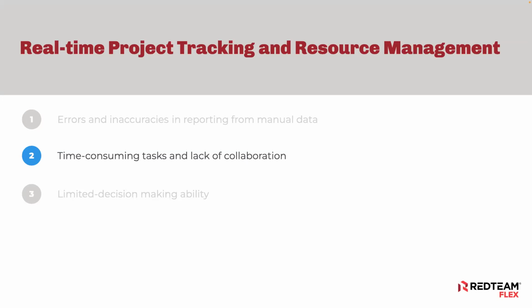So it was really safe to say that change orders consumed a lot of my time. And really, when you think about what goes into manually creating a change order, you're attaching that information, whether it's a drawing set, additional specifications, information on material, you're soliciting that price, you're ensuring that all scope was caught, you're sending it back and forth between either yourself, the general contractor, maybe the subcontractors, maybe an engineer, architect to kind of further clarify, and then final approval to that party.